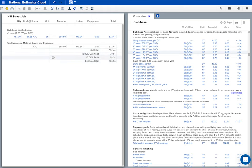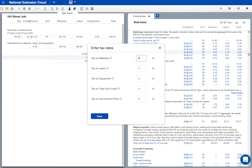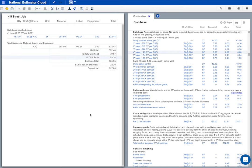I have to pay tax on materials for this job. National estimator cost books don't include tax. So let's add some tax. I'll click on the tax icon. Tax at the job site is 8.25%. And click save. Now we've got tax in this estimate.